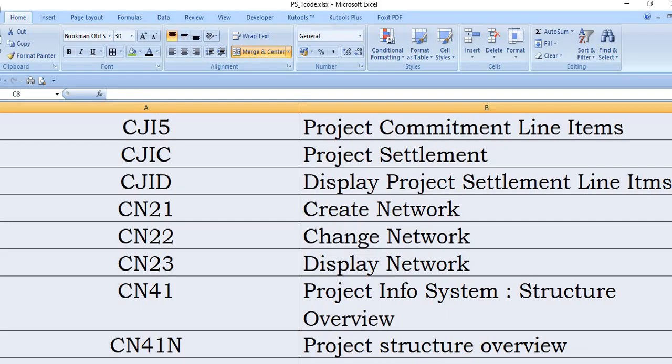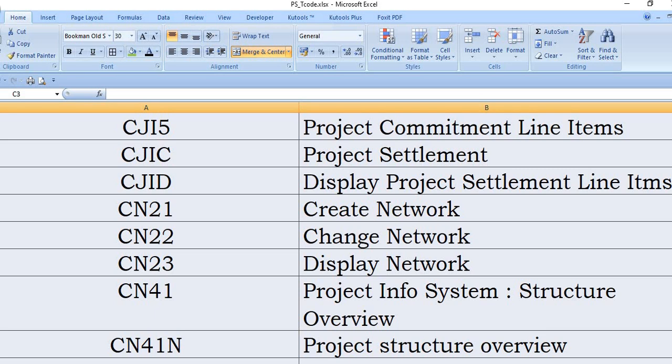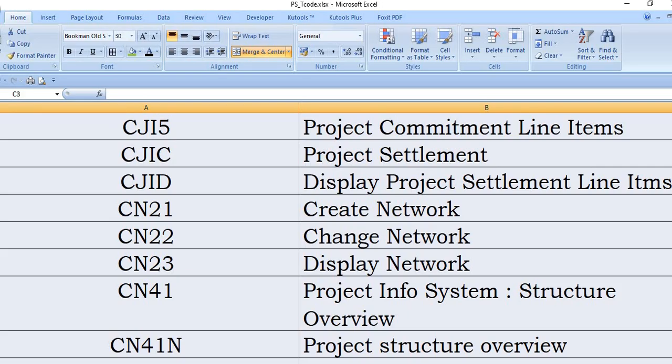CN41 is a project info system structure view. This is a very good transaction code. In CN41, you can display your summary in the project: what materials you have planned, how many line items, how many WBS elements you have planned. In each WBS element, how many networks are there. In each network, how many services, how many prime costs, how many overheads, how much amount of overhead you have planned. Each and every detailed summary you will get.